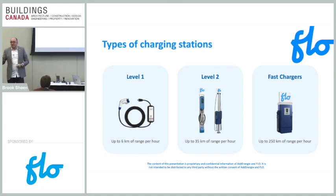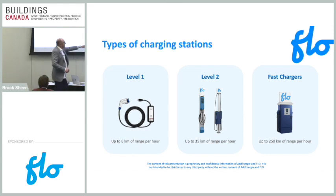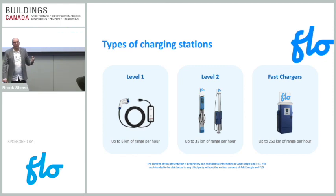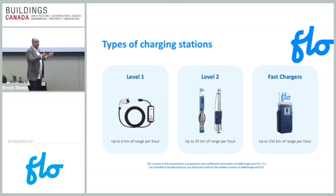But again, massive amounts of power. That 1,000 kilometers of range is taking on more than 20 single family homes in a week. So you see the difference in the strain on the utility side. If you ever do deploy a DCFC, do not do it without talking to the utility first, and making sure that the infrastructure is there, because there is so much different about deploying a DC fast charger than a level two.